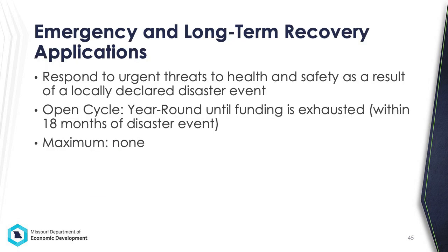Emergency applications address emergency conditions threatening the public health and safety that require immediate resolution. These operate on an open cycle, but the application must be submitted within 18 months of the emergency event in order to qualify as an urgent need. Long-term recovery applications are for proposed projects with long-term needs to repair or construct public infrastructure, and this can include water and sewer systems. There's no maximum, but please keep in mind that the funding can only cover the emergency repair, so the project scope should not go beyond what's needed to address or recover from the emergency.